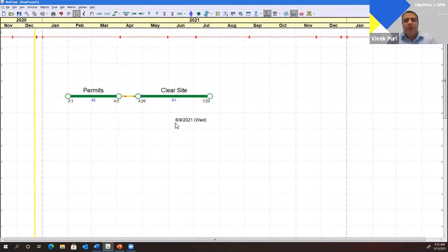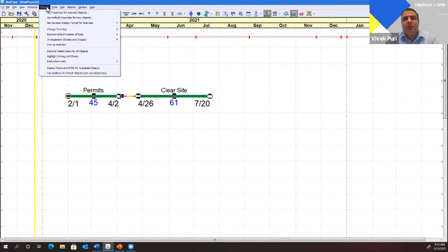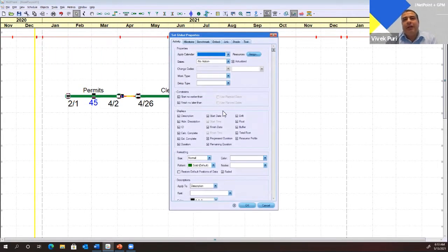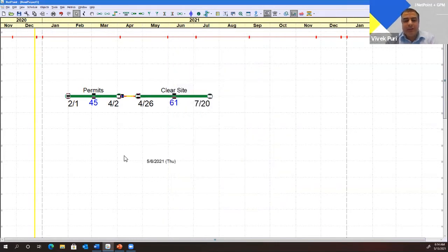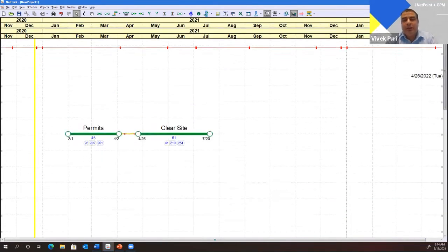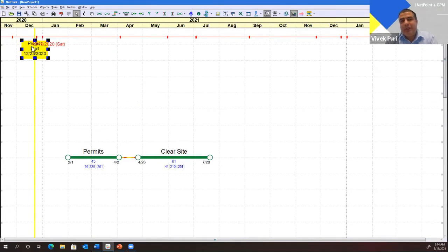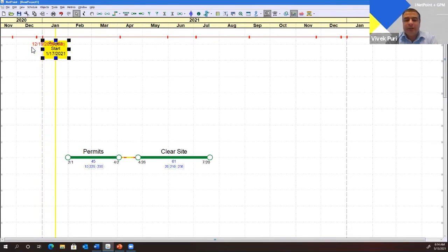Thank you, Tim. So the idea of float is similar to that we have in CPM algorithms. Float is basically the ability of an activity to delay its start up to the point that it starts delaying the project end, the duration that you can delay the activity start. In this particular case, GPM allows another property called drift, and drift is the complete opposite of float, which is how early can you move the start of an activity without affecting the project start instead.